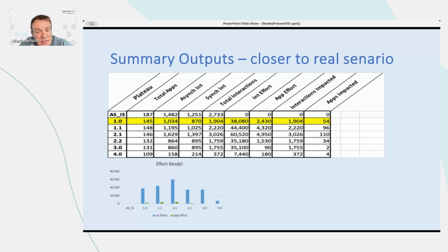So, to summarize again, this represents one rule set. You would generate multiple rule sets, and each rule set represents an approach to transformation. And you can probably guess from the model here that the more plateaus you have, the more likely the project is to succeed. However, the more expensive it becomes. So there's an endless trade-off. But at least you can model it in sites where this type of volume of transformation is required.